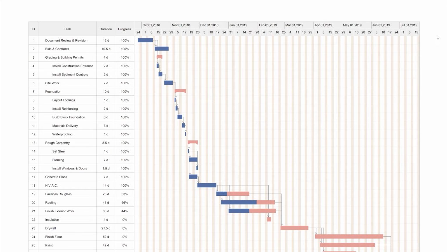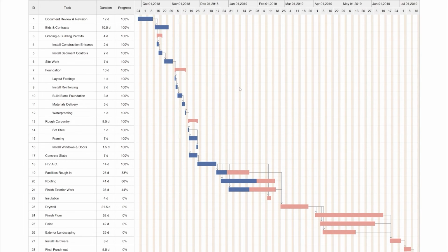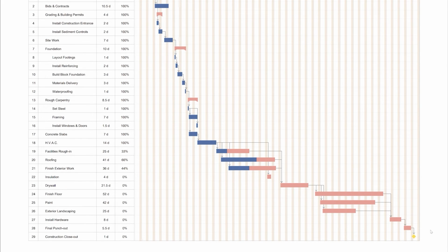So it's essential that you have an effective project plan in place that outlines all the necessary tasks. Break the project down into smaller phases, each with specific deadlines. This structured approach will provide a clear roadmap and ensure the project progresses smoothly and efficiently. Where possible, use parallel workflows to work on multiple steps at the same time. Instead of waiting for one task to complete before starting the next, identify areas where tasks can overlap or be executed at the same time.